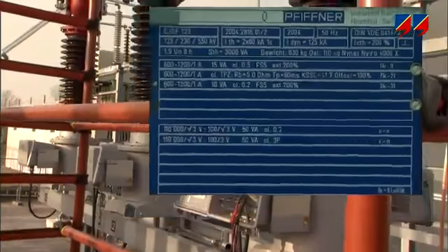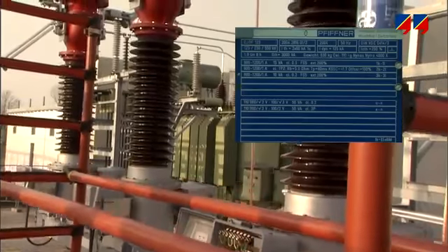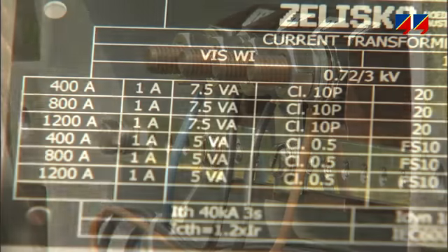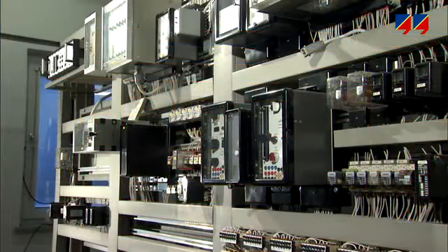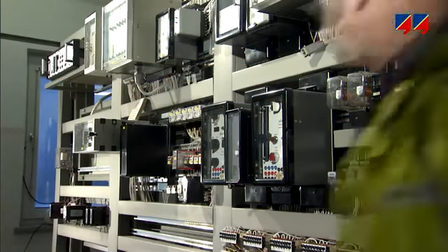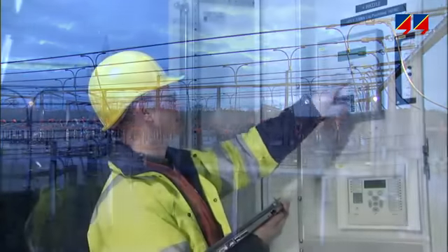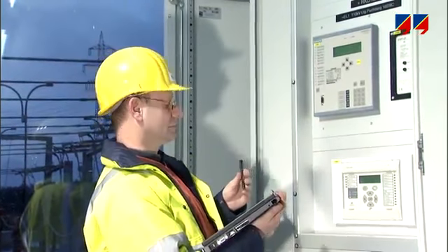After installation on site, commissioning tests verify that the CT has not been damaged during shipping and that the connections are correct. The protection system must be connected to the correct core and, for tapped CTs, the correct tap with correct polarity. The burden is measured to verify that it is below the nominal burden. These measurements are usually repeated when recommissioning the plant, for instance after refurbishment of the control and protection system.